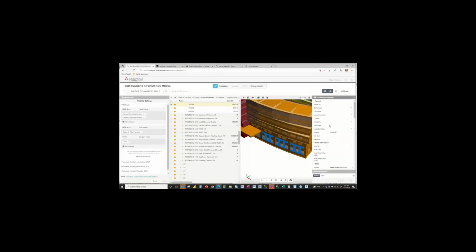we're going to be able to review additional property information that I assigned to that element. I've got division 4, a buyout package that I want to communicate with my contracting pool, which is the masonry package, CSI spec number, a full collection of Uniformat that I can group and sort and filter by.